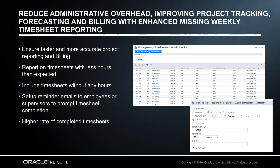Timesheets are the lifeblood of a services organization, providing the key data from which project reports can be kept accurate and up-to-date, billing can occur, and project forecasting can be assessed and planned. Outstanding timesheets can be a roadblock to these important processes. In the 19.1 release, we've added additional capabilities and new information to the missing timesheet report, making it more helpful and meaningful to the user. In addition to reporting on timesheets with less hours than expected, users can now include timesheets without any hours. Reminders can also be automatically scheduled to prompt employees and their supervisors to encourage timesheet completion. All lines on the report can be used to drill down into the details, improving project tracking, forecasting, and billing as a result of more timely timesheet submission.